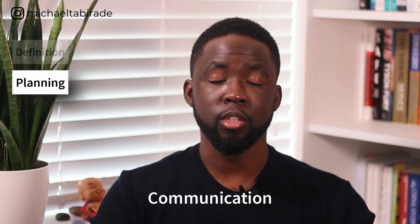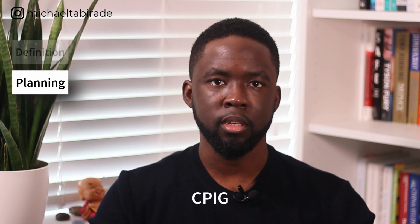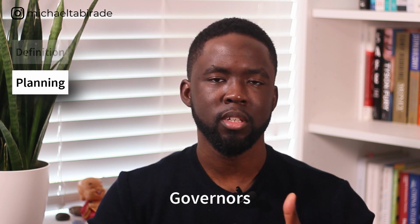Communication is another one. So how are you planning your communication? Again, in change management, they teach you to have some sort of comms plan or comms strategy that allows you to have the right approach towards your stakeholders. Now, you can use this great acronym known as CPIG. So that stands for customers, providers, influencers, and governors. There are different variations of that acronym. But again, it helps you categorize and understand what types of communications are required for different stakeholders.